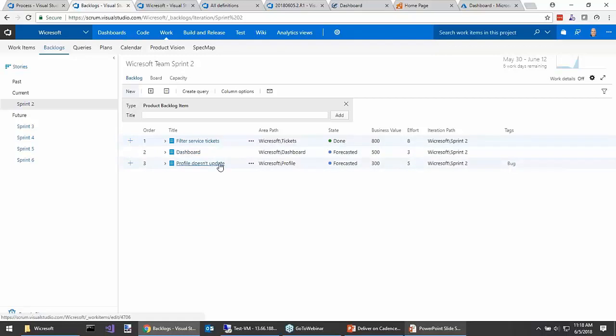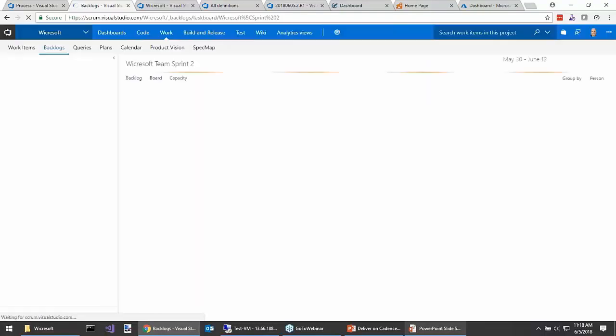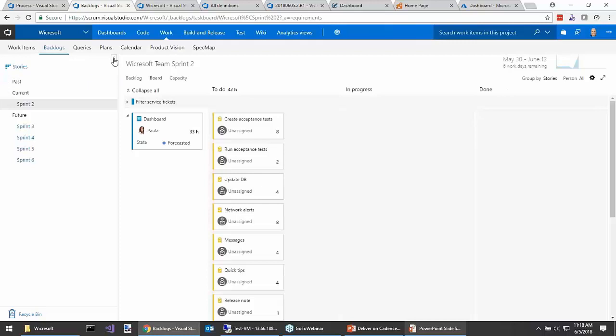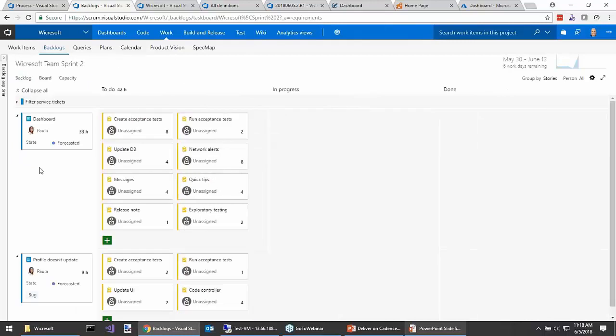Now what they also want to do is plan as a team. And really what that means, if I go to the board view here, I can show you what a plan looks like. There are lots of ways for a development team to formulate a plan. Task work items, or if you're putting sticky notes up on a wall, that works too. Failing tests is another way, or just conversation. If you've got a really good dev team, they don't necessarily need to break things down into all these executable tasks. They might just, in daily conversation, ask, hey, what are we going to work on next?